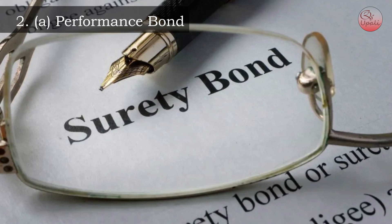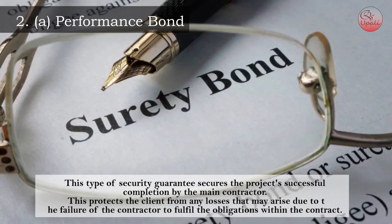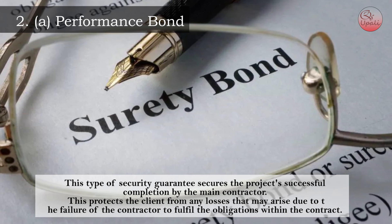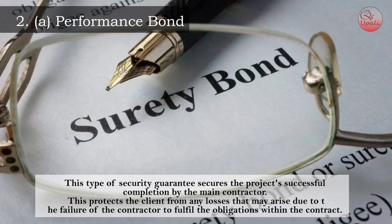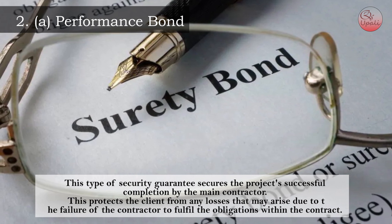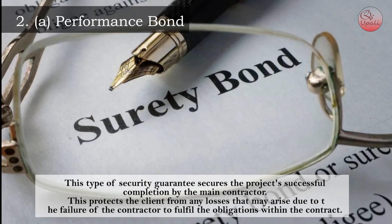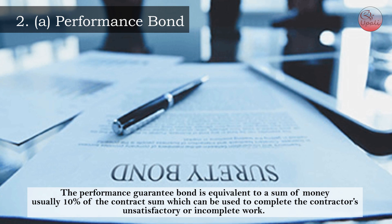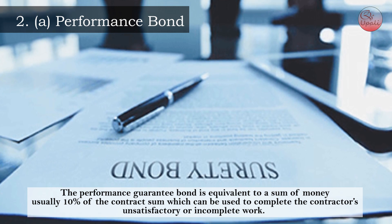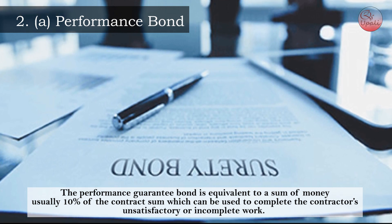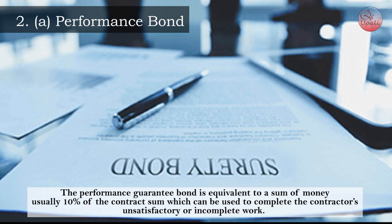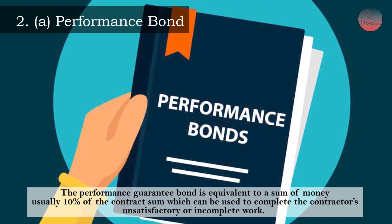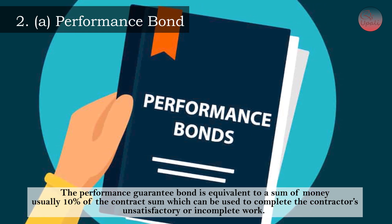A) Performance Bond. This type of security guarantee secures the project's successful completion by the main contractor. This protects the client from any losses that may arise due to the failure of the contractor to fulfill the obligations within the contract. The performance guarantee bond is equivalent to a sum of money, usually 10% of the contract sum, which can be used to complete the contractor's unsatisfactory or incomplete work.